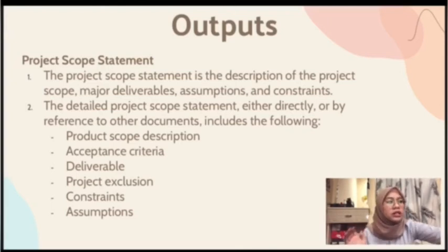Although the project charter and the project scope statement are sometimes perceived as containing a certain degree of redundancy, they are different in the level of detail contained in each. The project charter contains high-level information, while the project scope statement contains a detailed description of the scope elements. These elements are progressively elaborated throughout the project.